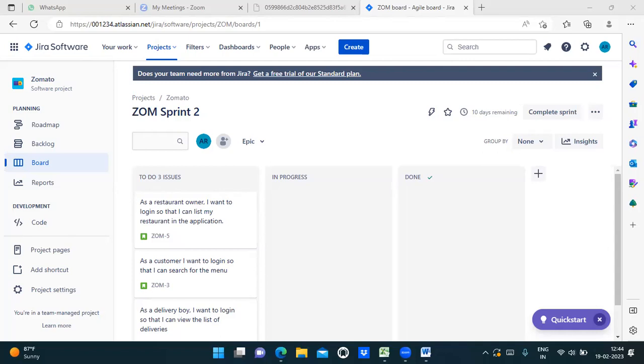How do we calculate the minimum, the MVP? We don't calculate it, Krishna Kumar. We have many techniques here. One is the Pareto technique, 80/20. We only discuss what the important features are, and we prioritize them, because we have a huge team to discuss what would go into the MVP. It's all based on the client requirements.